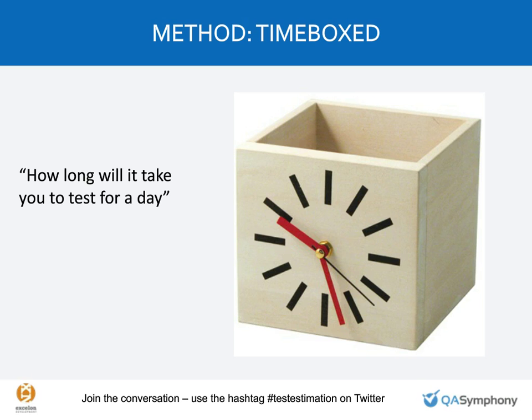So you're saying if you have a known time box, we can produce a list of all of the things that need to be tested and an approximation of how important they are, and then let somebody make decisions of, 1, is that time box okay for us, and 2, are these really the things we want to test? Well, the simplest way, if they trust us and we want to invest 1 day in risk management, we make a list of our risks, and we go through those risks until we run out of time. That's it.